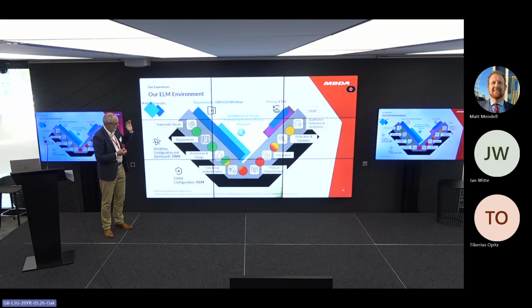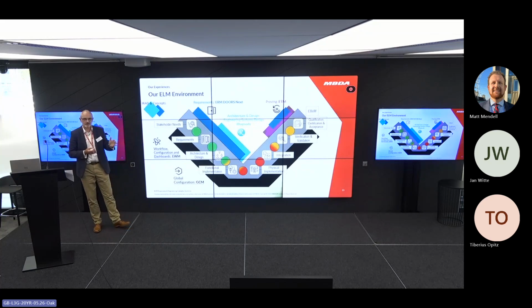And also, I mentioned it because it came up at lunchtime also, down the left-hand side now with requirements and the architecture and design in Doors Next, in Rhapsody, we're using the work item feature extensively. So any updates or changes required of requirements or architectural design, a work item is raised and qualified and approved and scheduled as well. It helps our engineers not just go and do it, really. It becomes part of the planning of what we're doing for our system, our software work and our requirements work. It's scheduled for when it needs to be done.